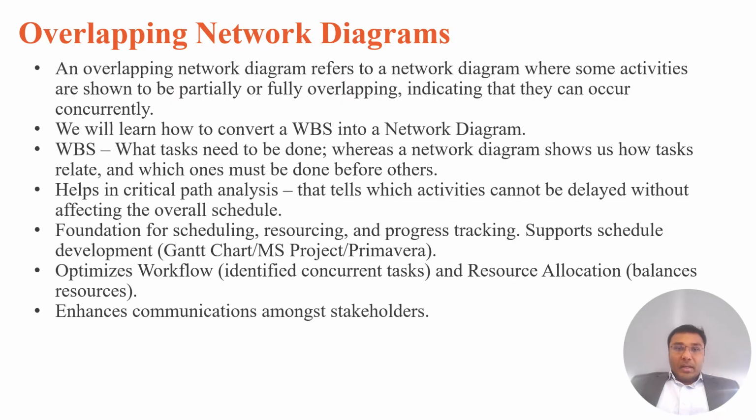What is an overlapping network diagram? In a traditional network diagram, we usually assume activities occur in sequence. But in practice, especially in engineering or construction kind of work, some activities will overlap. An overlapping network diagram shows these partial or full overlaps. This lets us optimize workflow by running tasks in parallel when possible, balance resources by avoiding bottlenecks, and it improves communication with stakeholders by showing concurrency of activities.